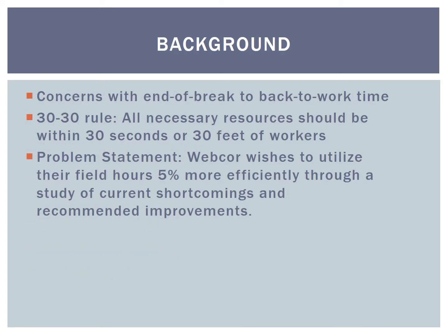Webcor chose to pursue this project because they have identified the potential for large economic savings if fieldwork efficiency can be improved. Currently, they feel there is a high level of inefficiency between the end of a worker's break and when they resume productive work. They are also concerned about violations of the 30-30 rule, which states that anything a worker needs should always be accessible within 30 seconds or 30 feet. Therefore, the problem statement for this project states that Webcor wishes to utilize their field hours 5% more efficiently through a study of current shortcomings and recommended improvements.